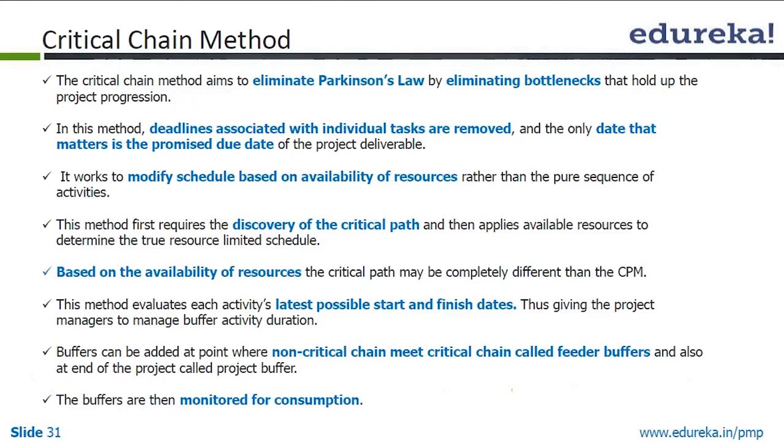And the method evaluates each activity's latest possible start and finish date, thus giving the project managers the ability to manage buffer activity duration. So buffers can be added at the point where the non-critical chain meets the critical chain, called feeder buffers, and also at the end of the project, called project buffer. Buffers are then monitored for consumption.